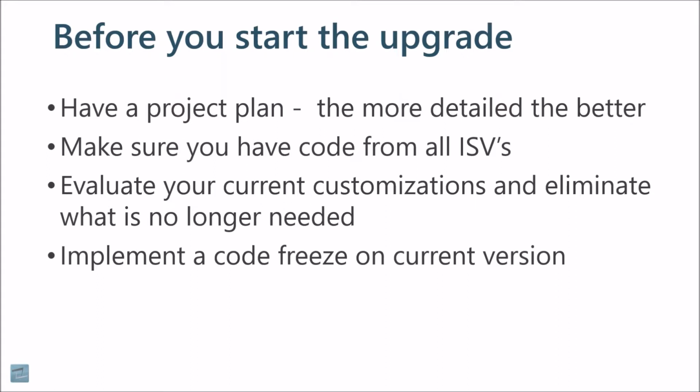The last thing that I would say from this slide is to implement a code freeze on your current version. You don't actually have to have that code freeze before you get started. But what we want to make sure is that people understand that it really is ideal if you do a code freeze, meaning we're not pushing any more code into 2012. David and I both understand what that means, and that there's a lot of pushback on that particular item.